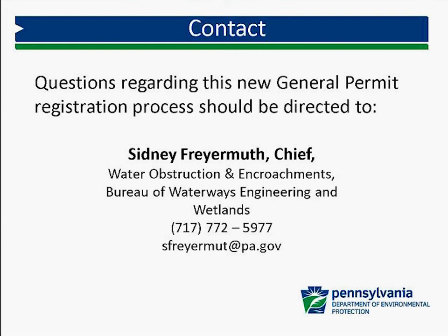Why were the impacts on the aquatic resource impact table changed from square feet to length times width? Because not all processes or impacts associated with a general permit are based on square feet. One of the GPs has a length not to exceed 200 linear feet. A GP3 for gravel bar is 250 feet. For bank stabilization, it's 500 linear feet. It's not square feet.